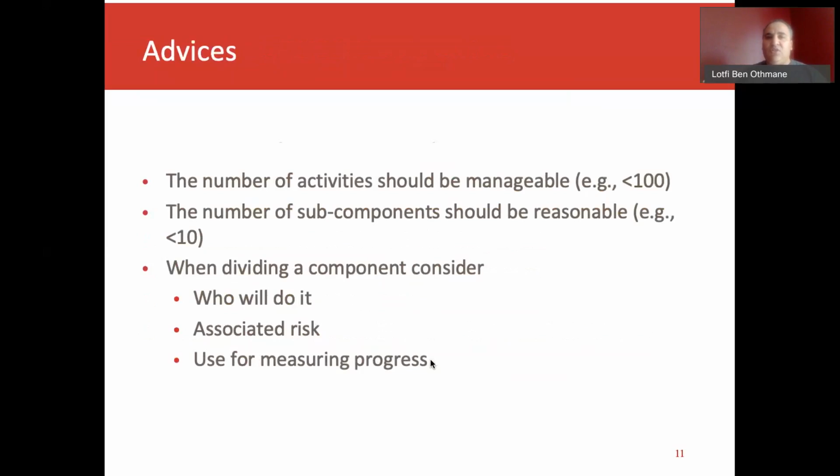When you do the division, also do not go beyond 10 items at the same level in the hierarchy. So if we go to level 2, then the number of deliverables, for example, if we decompose the system by deliverable, should not exceed 10 deliverables. If it does, then we really have to split that, so we can have something that we can manage.